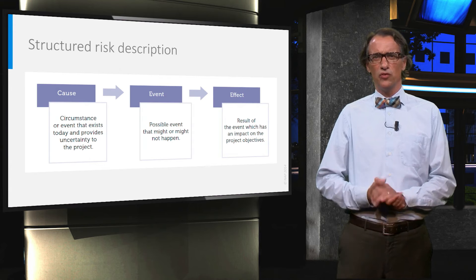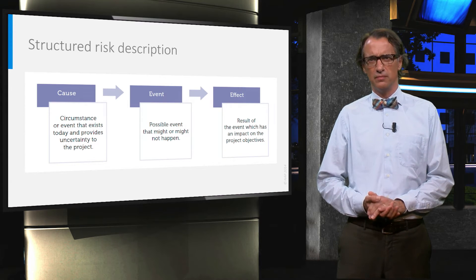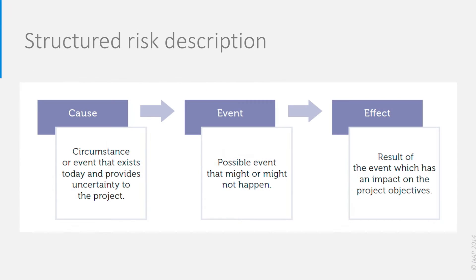Let's look at the proper formulation of a risk. In the project context, we distinguish the cause of a risk, the risk event itself, and its effect. The cause is the circumstance that exists today that provides uncertainty to your project. The event is the possible event that might or might not happen. The effect is the result of the event which has an impact on the project objectives.